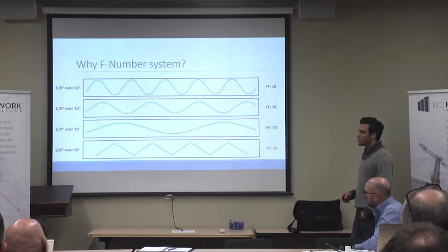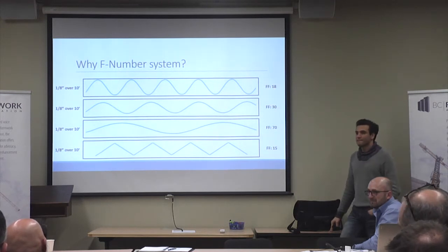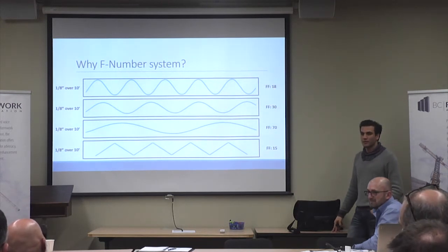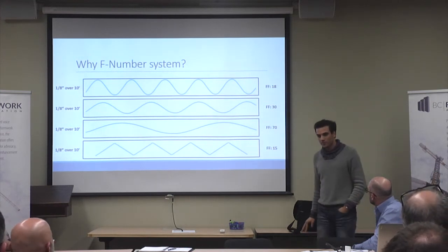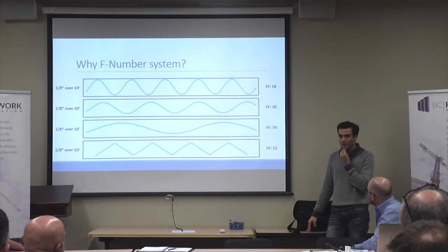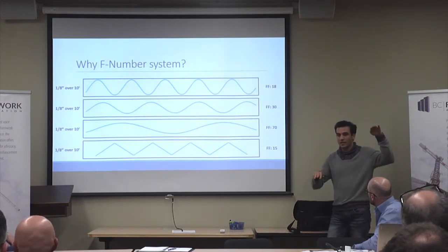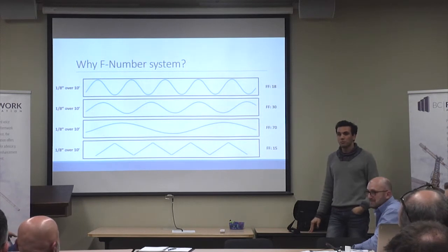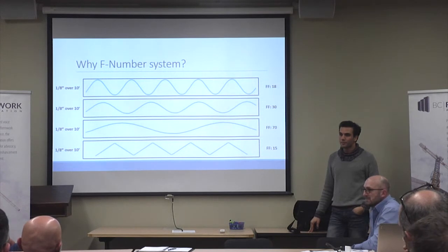What does our flooring association like? On average, you want 25, 30. Which one is FF? Because I have FF25, FL30. Wow. Or FL higher. FL higher than FF. Yes, that's the lowest number you want to see. The lowest number is 25. And that's going to depend on the floor covering.